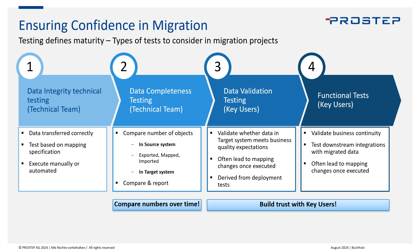The next two test types are about building trust with the key users. The first is data validation testing, which needs to be prepared and executed by the key users. Preparing these tests forces key users to really look into the new data model and new methodologies introduced in the new system, which will make them more confident. When executing data validation testing, it's about validating whether the data in the system meets the quality expectations key users have, and whether it's correct from a business perspective — not just matching the mapping specification, which can be wrong.